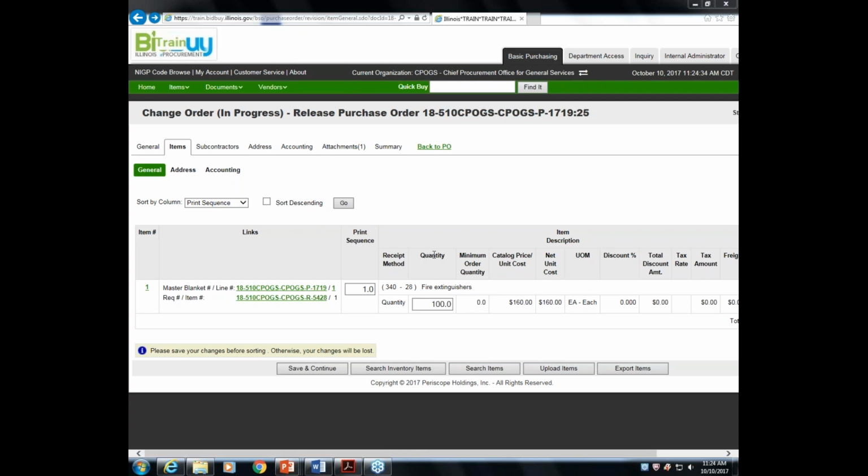So this process that I just completed was the release off master contract with a direct release that was sent directly to the vendor. The vendor then did respond with an executed contract that was executed and then attached to the purchase order. So at this point, I'm going to turn it over to Amy, and Amy can answer some additional questions as well as demonstrate some additional processes.